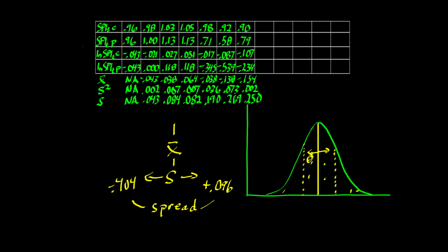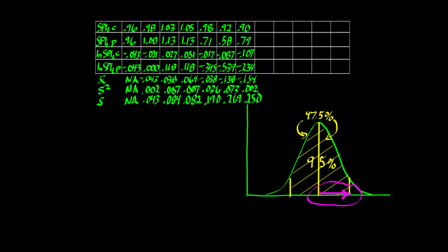Under the curve, the total area is, by definition, 100%. That area includes outliers, but they are not likely values. So, narrow the area. Say we only want measurements within 95% of the area under the curve.